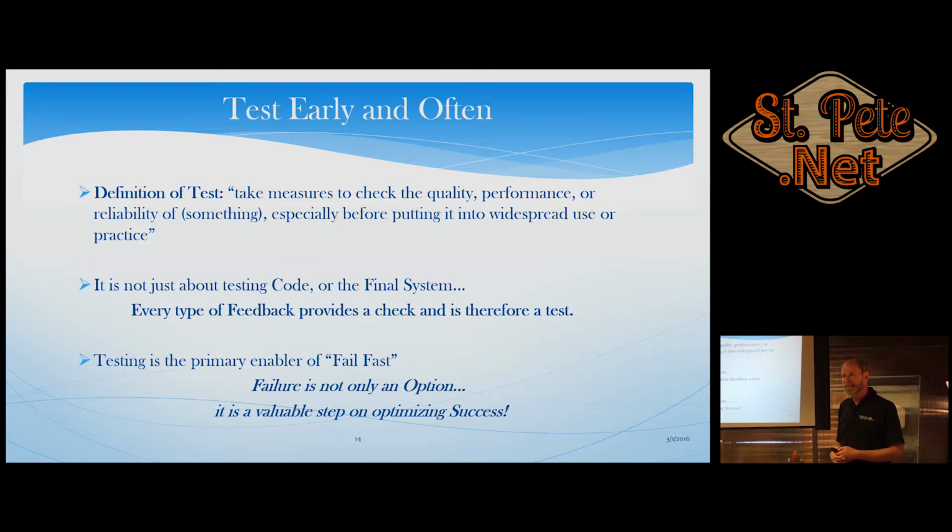If you don't fail at certain things along the way, you're not likely to be achieving the best results. I have some teams that, every sprint, we deliver every single user story. We haven't missed a user story in 6 months. Sounds great, right? And all of a sudden you look and they're only taking in enough user stories to do maybe 60% of the velocity they could realistically achieve. But they've cut their velocity so far down that they're wasting 40% of every sprint nominally because they won't take the risk of maybe 1 out of 10 sprints missing a user story. They become too conservative.